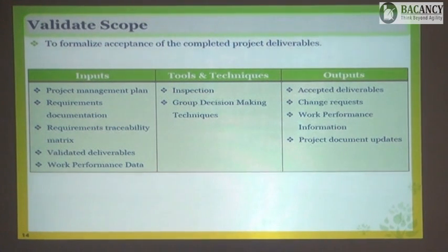One variation in civil can impact significantly your automation, electrical or plumbing work. How can you decide whether this will be accepted or not? This has to be accepted by the authority who knows where this work is going to be linked to the other areas. So even if it is a cost saving for the customer, you must take it to the customer and take their approval first.